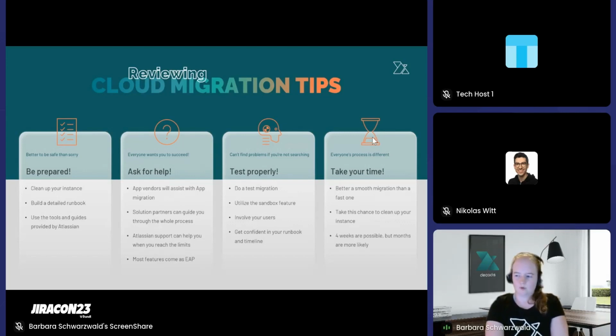You can utilize the sandbox feature in the cloud, which makes it easy to clean up afterwards. This is also the perfect opportunity to involve your users, show them maybe the new features in the cloud, let them mess around in your test migration instance and try out the new stuff without being able to break anything. And this will also be very important for you to get confident in your runbook and timeline, so in your plan about what you need to do and when.